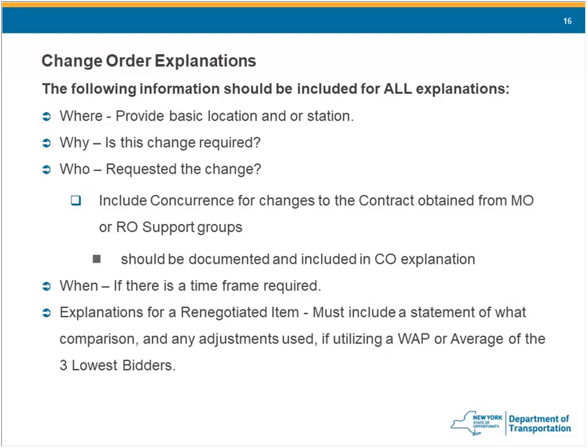What can happen is if you have a $0 change order, I don't see it as much anymore, but site manager used to assume that that was a field change payment, whether you selected that or not, and it would limit the approval level. I haven't seen that in a while, but that used to happen quite often. At the end of our slides, we will discuss overriding site manager's assumed approval levels.